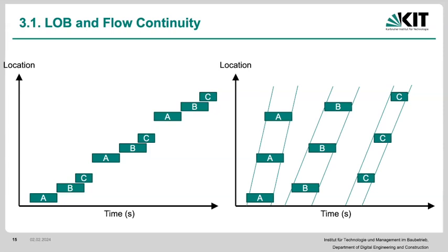And activity B, with some buffer, can be carried out as well, one after the other, and then activity C. So right now, we've shifted from the left-hand side, which is our typical A before B before C, into every A for all of the units being carried out together. This by itself also has the benefit that we do not need to hire and lay off these crew members for each and every one of these activities for that particular unit.